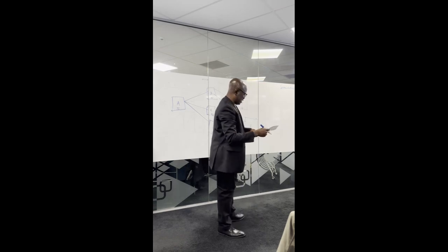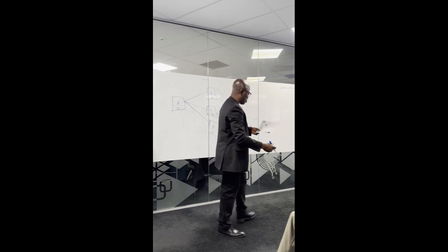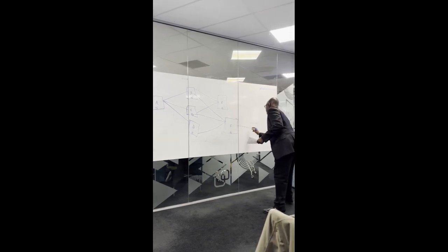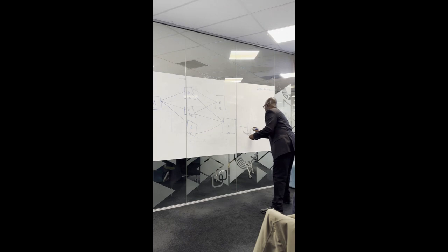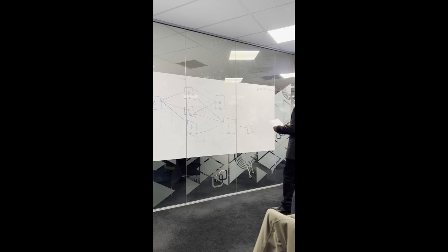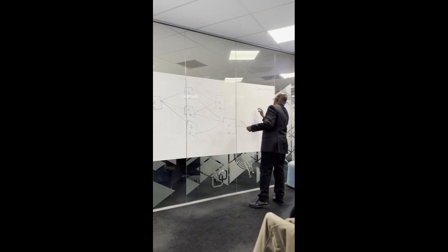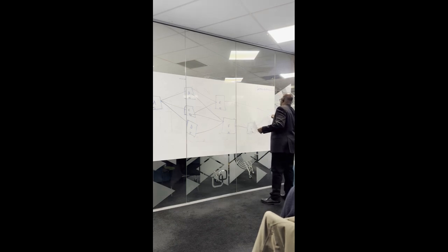Now we say activity G, which is wait for construction, is preceded by F. This is our activity F. So we draw straight like this. We put activity G in the center, right? We have 170. Now we come in, we have activity H, right? It is preceded by E and G. This is E and G. We say activity H, 35 days.